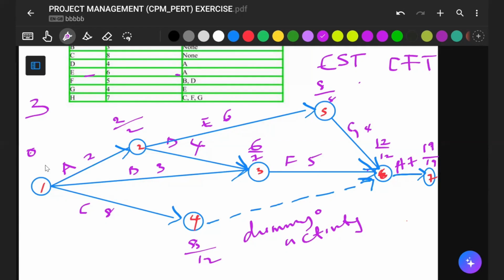Because we are saying we are going to go for the lowest one, between 4, 4, and 0, of course, we'll go for 0. How? 2 minus 2 gives us 0. 7 minus 3 gives us 4, which is greater than 0. And 12 minus 8 gives us 4, which as well is greater than 0. So we stop here.